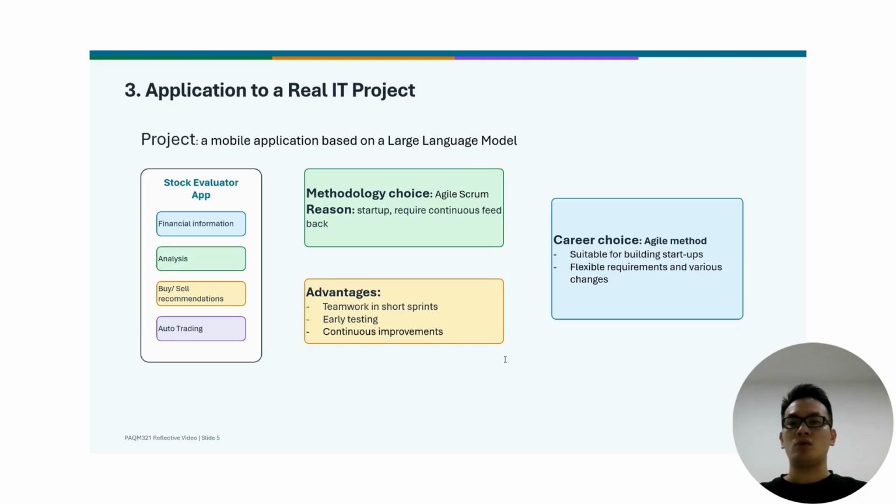Agile would allow the team to work in short iterations, test features early, collect feedback, and improve the product throughout development. To manage the project timeline, I would use a high-level Gantt chart to plan major phases and milestones. I would also use task dependencies and the critical path method to identify activities that could affect the overall completion date. Within each Scrum sprint, I would manage the work through a sprint backlog and short, fixed development cycles.